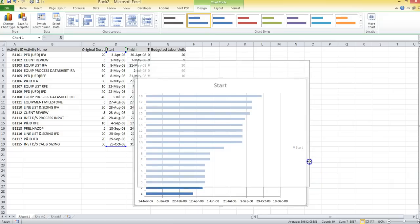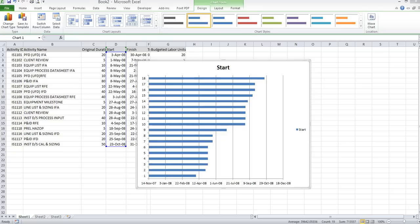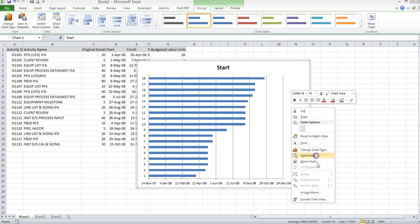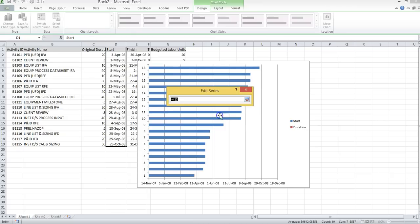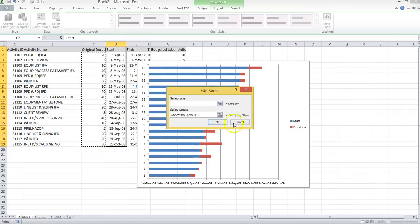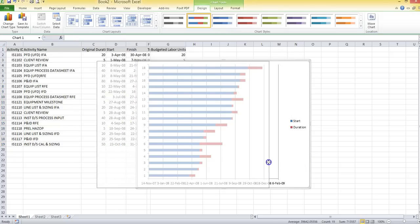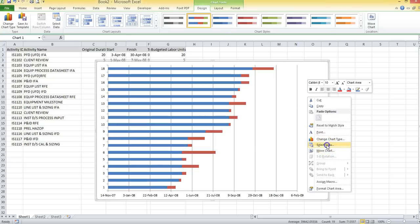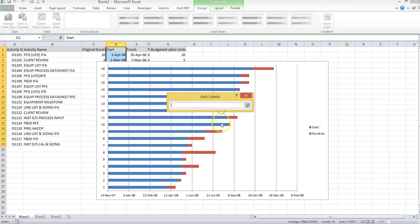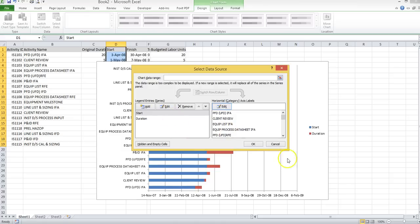When you select this you're going to get something that looks somewhat like this. Expand this out and you'll see the initial bars spread. Now you're going to make it look like a Gantt — you'll take the next set of data and add duration. I'm going to rename it 'duration' and select the criteria here, which is our original duration. You're going to get something that looks like this. Then you add the labels for your duration by selecting the series and editing to access the activity name, which in this case is the deliverables for process. You'll see they've shown up on the chart.